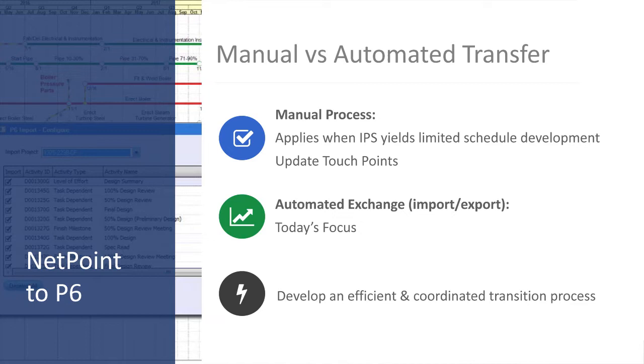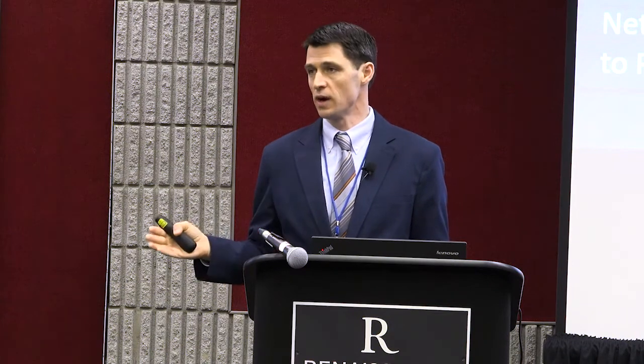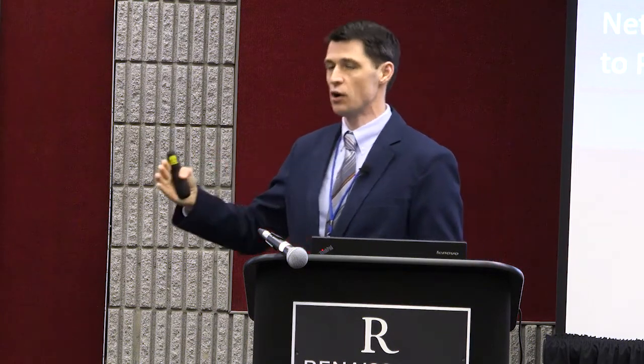There are 2 ways to get information from Netpoint back into P6. There's a manual process and an automated process. And we're probably at a 50-50 balance here, where we'll get those smart people in the room and do a planning session, and we may talk for 2 hours, but then you look at the Netpoint file, and we've got 4 or 5 activities.